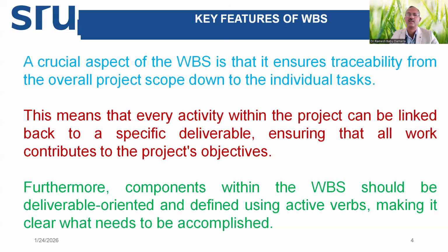power supply connections, then braking system. So like this, it is divided into subsystems. Each one is an expert area which we can allocate to an expert team. And each subassembly is connected with its sub, micro, nano components. It is easy to trace which belongs to what in case something goes wrong. So this traceability from the overall project scope down to the individual task is very much connected.